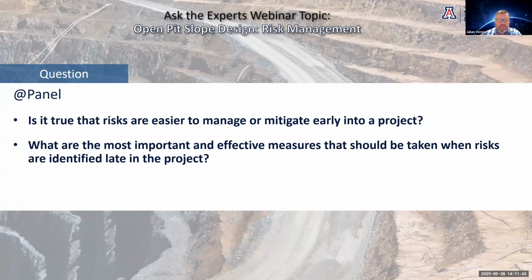So as you move towards a feasibility study, it probably gets a little bit easier to solve some of these problems because you lose a few options as decisions get locked in, but you also get more data. But once you get to the pit shell and you actually mine the crest, if you're about 2 benches down on a new pit shell, that decision locks in a lot of other decisions and it removes a lot of other options. So I'd say that it probably gets a bit easier up to starting a new pit, but then once you've started a pit, your options to change reduce very quickly. So that pit shell crest is your most important decision you could probably make because that drives everything later on.